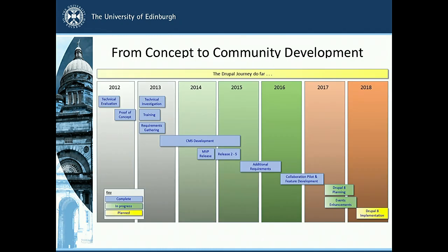So I'll take you a little bit through the journey we went on to get to where we are today. Back in 2012, we had an initial look at Drupal. There was a desktop evaluation that produced a small report and said, yeah, Drupal's something you can look at a little bit closer. So at the end of 2012 we had a proof of concept project. We took 11 key requirements and analyzed them closer to conclude: would we be able to meet these requirements with Drupal, yes or no? The answer was all yes, so we decided to progress this.